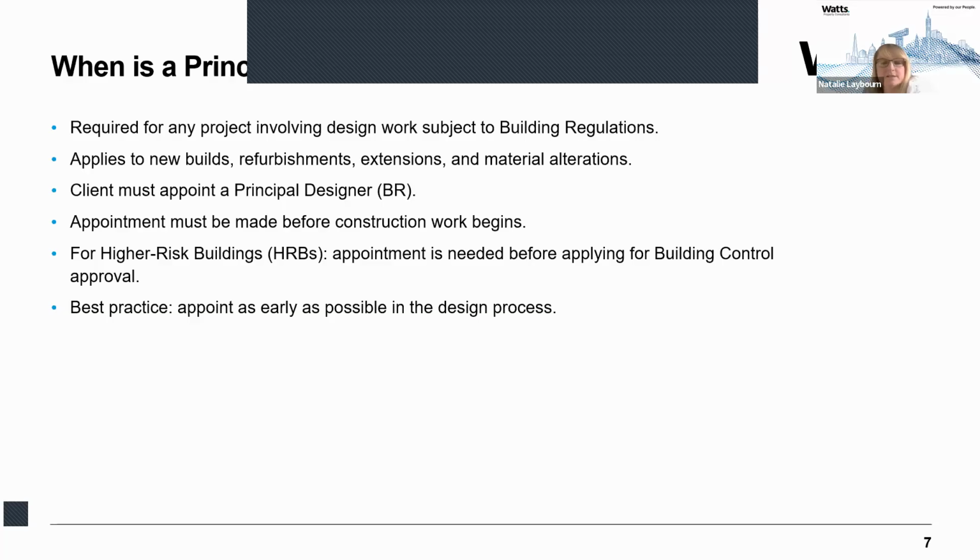Under the regulations, the client is legally required to appoint a principal designer before construction begins. It is important to note that if the client fails to make this appointment in writing, then they automatically assume the role of principal designer. It means they take on all the associated legal duties and responsibilities. This does align closely with how the principal designer appointment under the CDM regulations works as well.